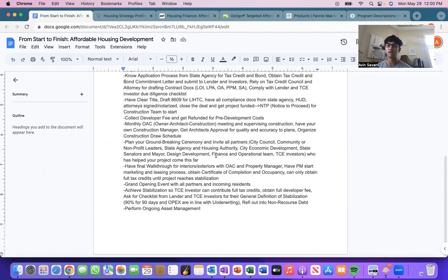Yes, you'll have to pay some type of construction management fee to that construction manager, but I think it's well worth it, because you save a lot of costs in the long term in that initial construction budget, and you're also just having the best interests of the owner in mind. So that's very important. And again, I've stressed this in the past, that construction management at agency is the best way to go, and having those subcontractor contracts directly with the owner is best.